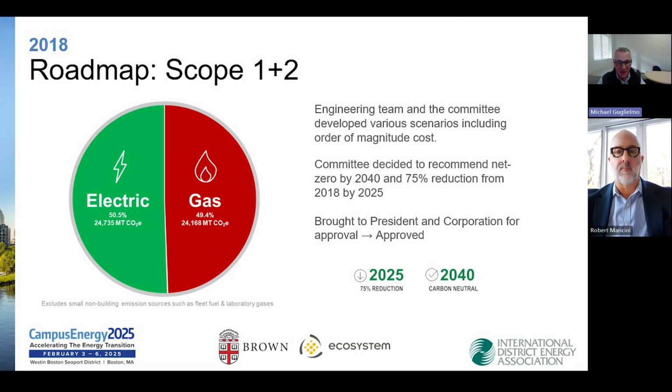It focused on collaboration, inclusive project development, and broad institutional support. Challenges were differing ideas of how quickly we could reach net zero and decarbonize, and of course, the cost to decarbonize. Our initial plan had us taking it out to 2040 with thoughtful analysis of what was achievable from a campus disruption standpoint. We were considering the earliest we could feasibly decarbonize campus while maintaining expected operations. At the time, based on the estimated cost, it was determined that the 20-year span could absorb the cost, particularly due to utility savings from the renewable energy PPAs.